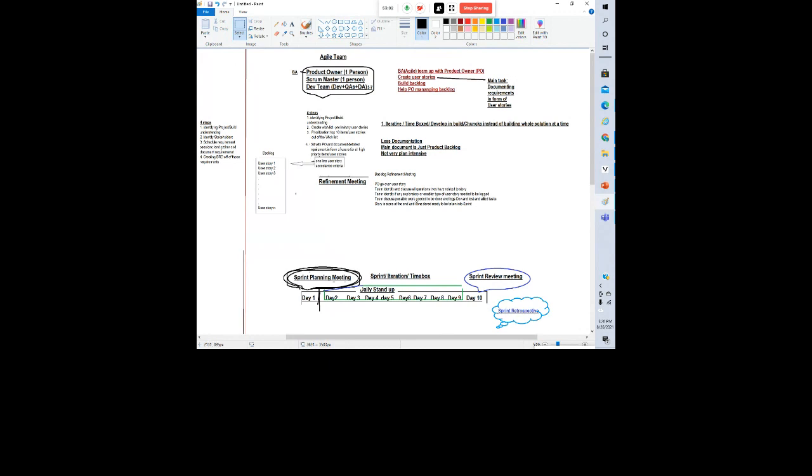Team identify if there is any technical story or some enabler story that is needed to be worked on. Means, like, if they are developing a functionality, they might need some infrastructure, which is kind of a road, you can say a track, on which that functionality will lay. Okay, so there might be some other work needed. So if there is any work needed to deliver that functionality, team identify that, and the product owner